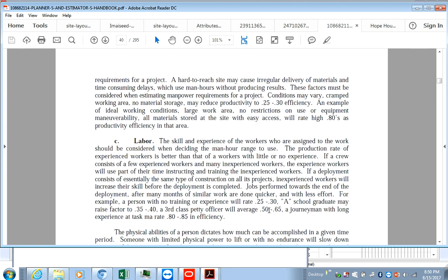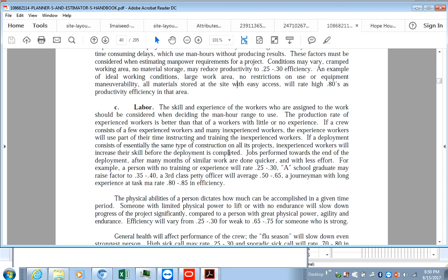You see, they're just saying the same thing. It's very difficult to get 100% productivity. So if you're assigning resources to activities with the assumption that they will perform those activities to plan, right? And you've estimated a particular amount of time, the assumption is that they will perform at a schedule performance index of 1, and also a cost performance index of 1. That's the assumption. Remember, estimation is an assumption of how long the duration will be.